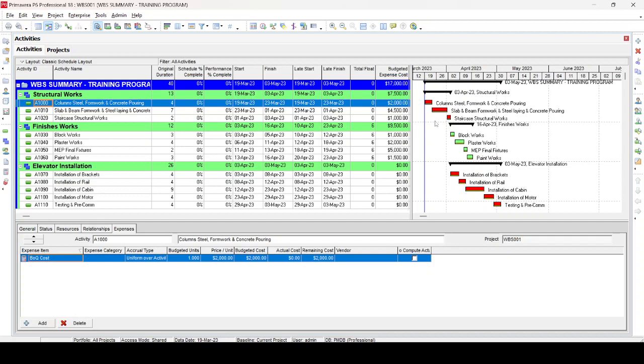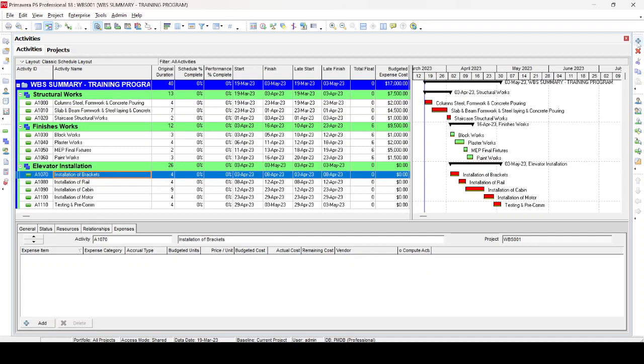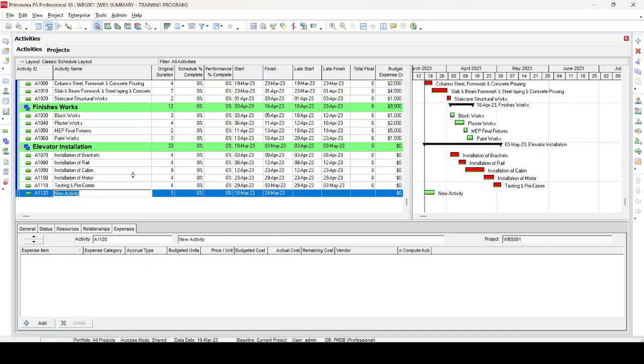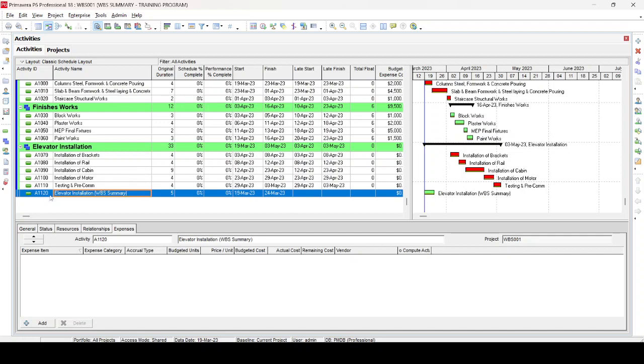And in our program, we have more activities. To overcome this issue, we just add a single activity as normal. We add activity and then make it elevator installation, any appropriate name for this activity to be easily identified. We make it WBS Summary so that anyone can read it and understand this is the WBS Summary and will treat it accordingly. For WBS ID, I prefer to change the ID also for easy identification, so WBS-ELEVATOR-010. If you have several WBS activities, it is preferable to assign a particular activity ID nomenclature for these activities.